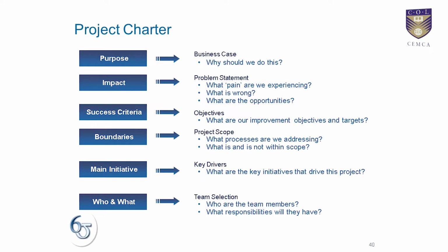And it also contains the names of the people who are involved in the project, along with their roles and responsibilities. So we also write about what the project is, how many people are there in the project team, and what are the roles and responsibilities. Then at the end it tells the timelines: what are the key activities, what are the key milestones that we'll achieve, and we write the tentative dates. So this is at a high level.